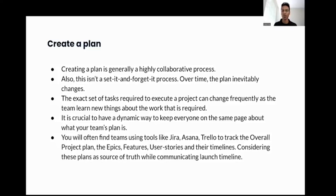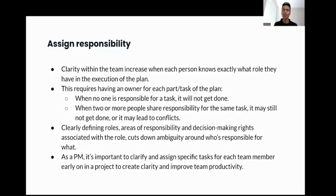Now that you have defined the mission and created a plan, the next step in creating clarity is assigning responsibility. Clarity within the team increases when each person knows exactly what role they have in execution of the plan. This requires having an owner for each task — when no one is responsible for a task, it will not get done, and when two or more people share responsibility for the same task, it may still not get done or may lead to conflicts. Clearly defining roles, areas of responsibility, and decision-making rights cuts down ambiguity and increases clarity around who is responsible for what. As a PM, it's important to clarify and assign specific tasks for each team member early on in the project to create clarity and improve team productivity.